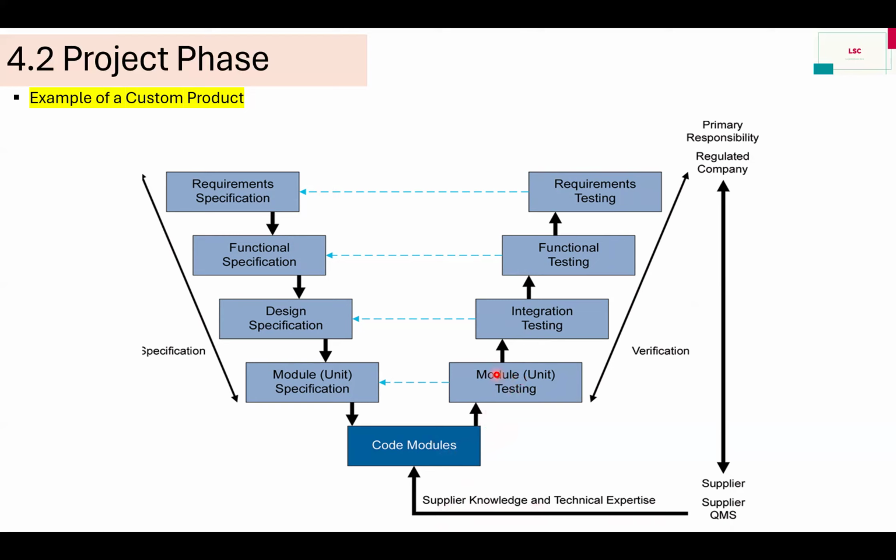After that, we have to test the module unit, then integration testing with respect to the design specification, then functional testing with respect to the functional specification, then requirement testing with respect to our URS.